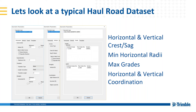There are quite a few different inputs and you can look at different design speed criteria — for example, run one analysis at 14% and one at 12% and see the cost impacts of each. You can also have different geometry within a single study area by defining a polygon: stick to 12% in one area but allow up to 14% in another. The system considers that, and when the alignment reaches the higher-grade zone it will apply it — but only if needed. It's a pretty sophisticated analysis when generating those alignments.